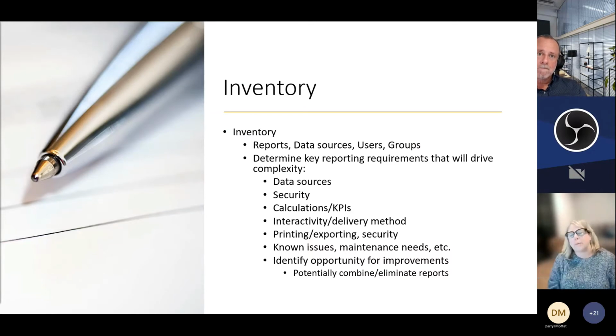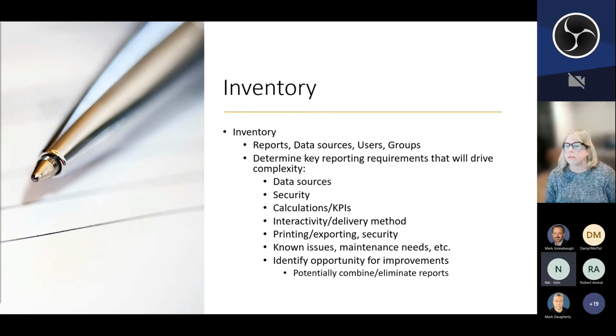All right. So when you're taking your report inventory, just like Rosa was asking about, using audit logs or metadata or databases that exist in your current platform, leverage those wherever you can. Some can be queried. I know if you keep Tableau server usage data, you can query that and determine report owners. You can determine who's using it and how much they're using it. So a lot of the tools are going to have some way of doing that. And that particular thing should also present to you somewhat of an inventory.